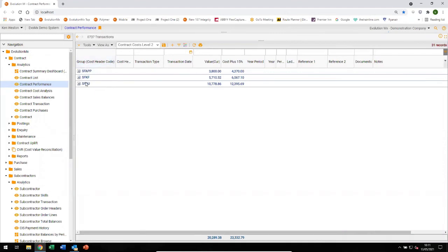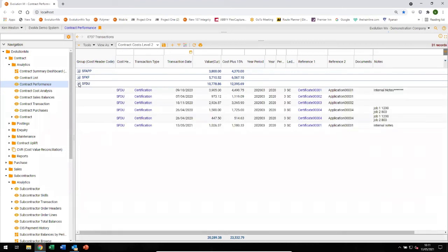So these are the cost heads relating to subcontractors, where you could then expand upon particular aspects of interest, being able to see the certificate value that we put through there for what went through the application and the sign-off process and the resultant payment certificate. So we've now got a cost associated with that sitting on the contract, recognising it's come from the UK ducting subcontractor. Okay, with any other calculations on there as well. So I've included a user-defined calculation to say add 15%, just because that's what I want to use as a basis for my valuation going forward.